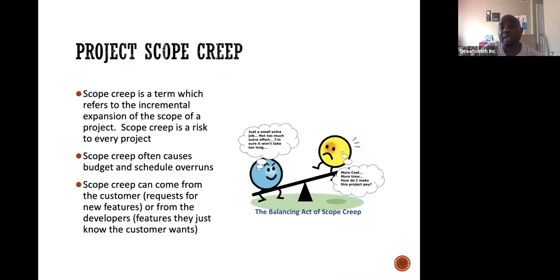Then the project manager will shift the duration. If the requirement is going to impact resources, if it's yes, then we are going to look for resources, which is going to impact the timeline. Is the requirement going to impact our existing functionality? No, it's not, because all these questions are going to be answered by developers.